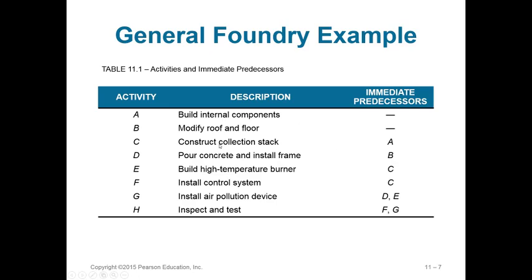Now, for C to occur, A had to have occurred. So C cannot occur until A has been completed, just like D cannot occur until B has been completed.